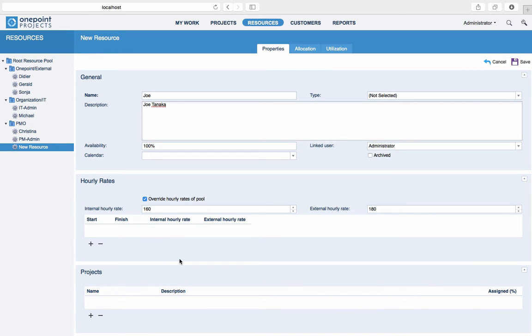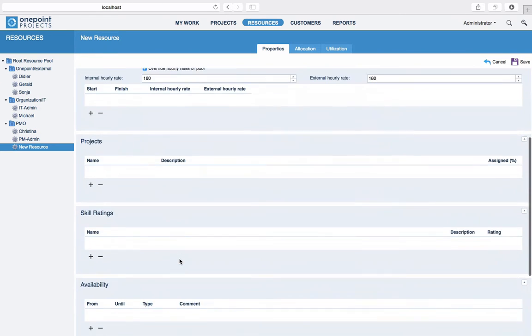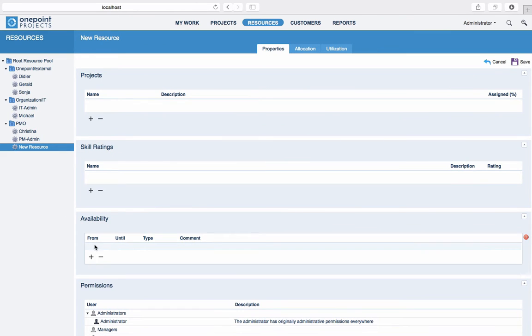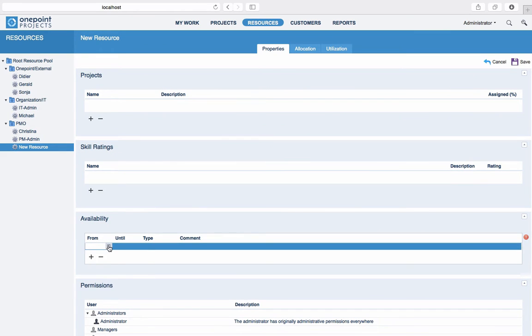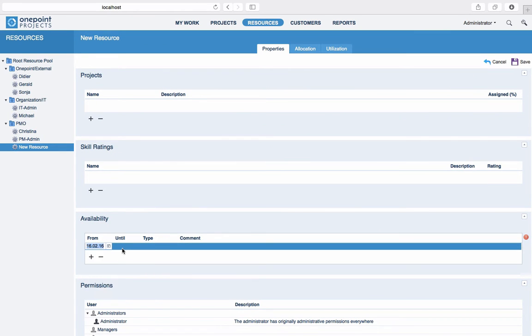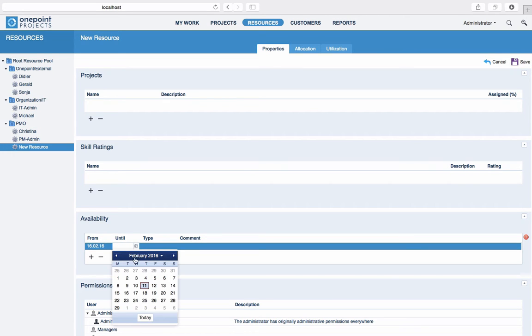You can also specify absences for your resource under Availability, for example an employee's planned vacation, which in turn will be taken into account for scheduling calculations.